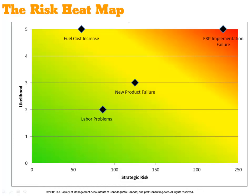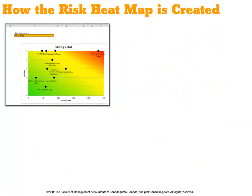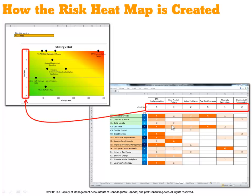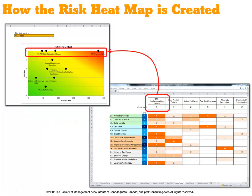Let's remind ourselves of how this chart is created. In this spreadsheet, you identified each of the risk elements across the top of the spreadsheet, and down the left axis, the strategic objectives and their priorities for this period. The likelihood is charted up the left axis. If we take a look at the first risk element in this chart, ERP implementation, you'll see that it has a likelihood of 5, and therefore will be charted somewhere across the top of the chart.